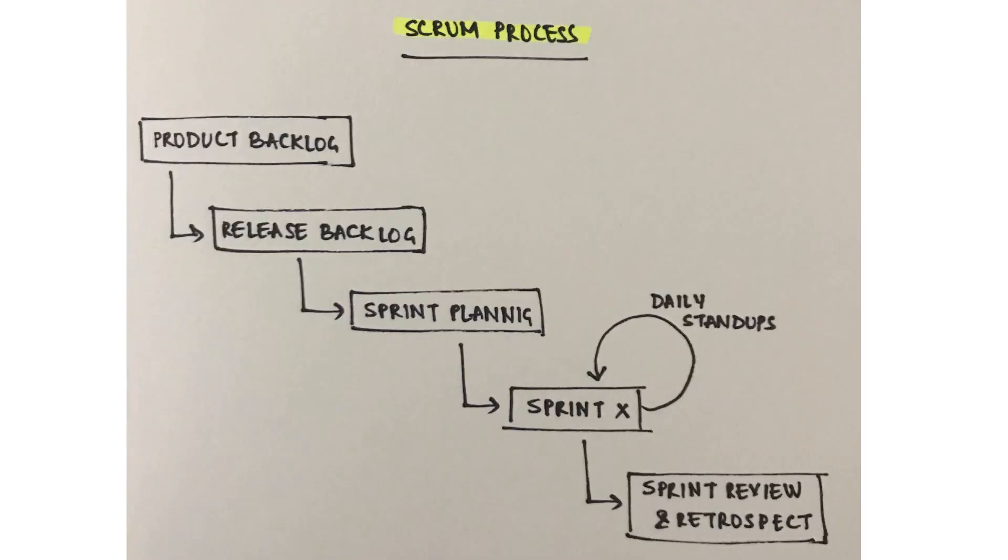So this is what a scrum workflow looks like, typically beginning at the product backlog and then where the product owner makes the release backlog and then sprints are planned by the entire team. Once each sprint begins there are daily stand-up meetings where the plan, the progress and the problems are discussed, and at the end of the sprint a sprint review and a sprint retrospective meeting is done to improve the process overall.